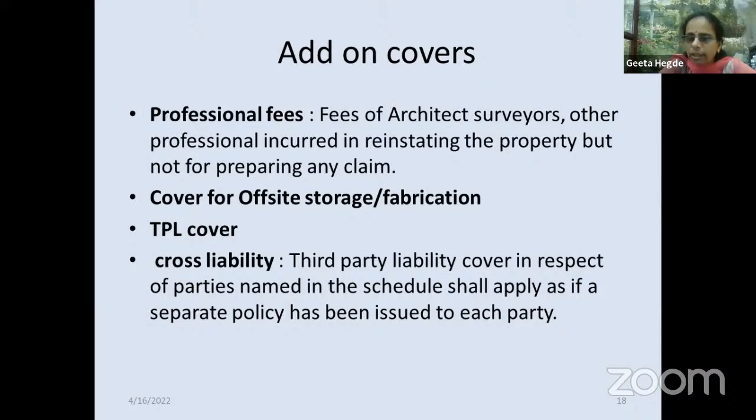So in case there is a cross liability, any third party liability arising in respect of parties who are named in the first schedule shall apply as if a separate policy has been issued to each party. So both TP liability, even if it is falling against a person named in the policy as an insured, will also be treated, and the policy, though one with two insureds, will be treated as if two policies are there and both claims will be entertained. So that is the cross liability.